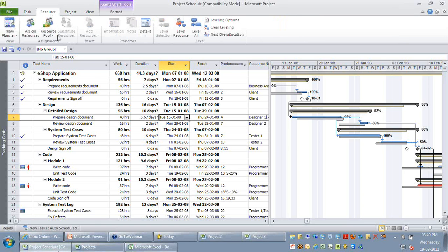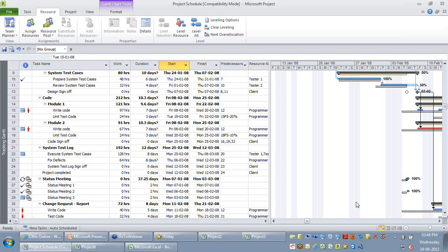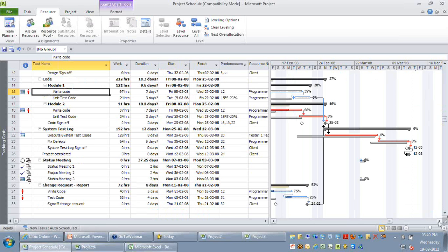For example, let's say this is my project plan, and I want to look at whether this activity is going to create an impact on my project finish date. As you know, my critical path can generally be used as a technique for identifying whether it will have an impact or not. Let's take the execute system test cases. As you can see towards my right, this activity is 0% complete. If you want to know whether this activity is going to create an impact on my project finish date or not,